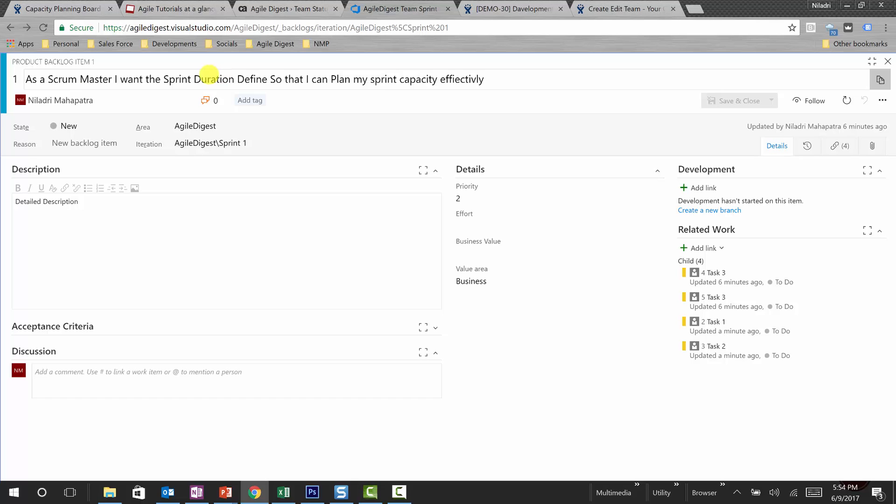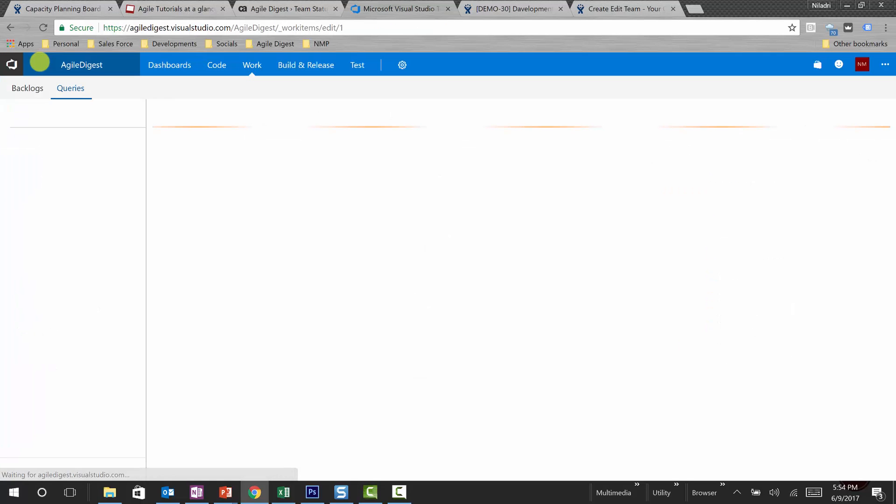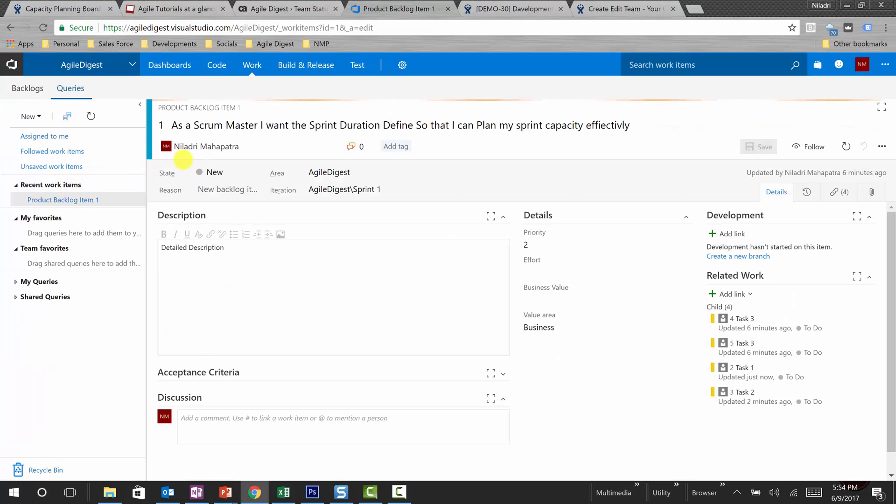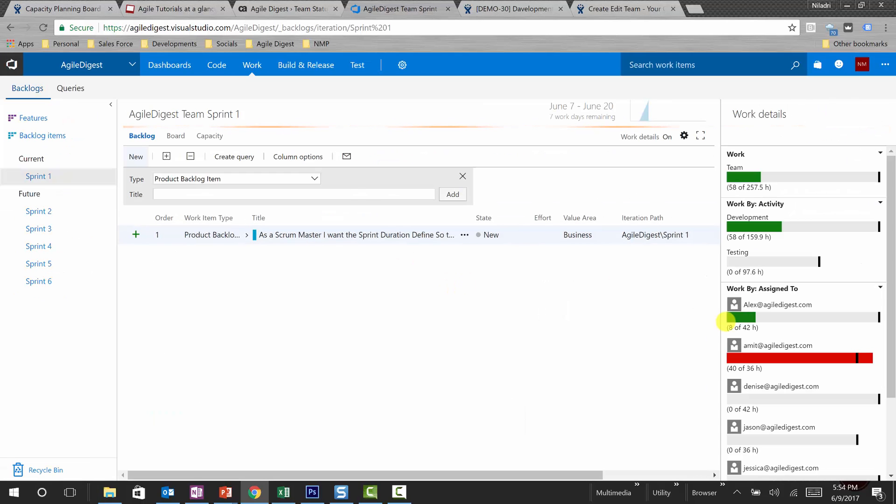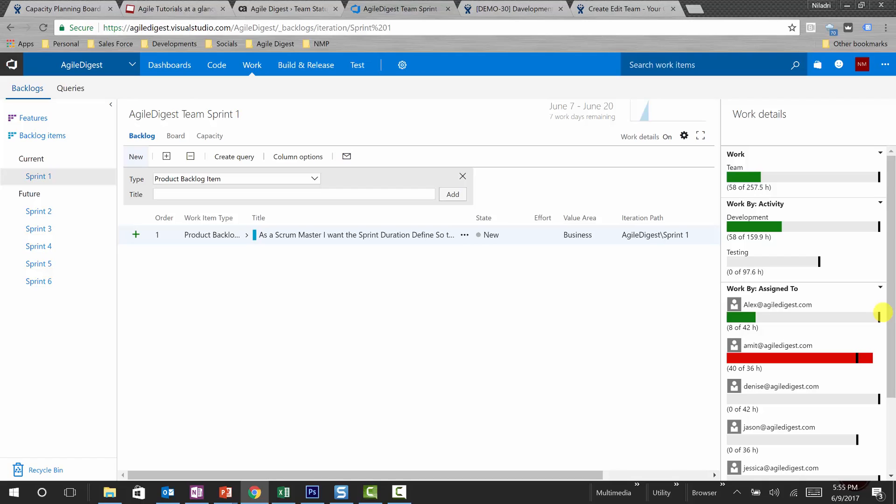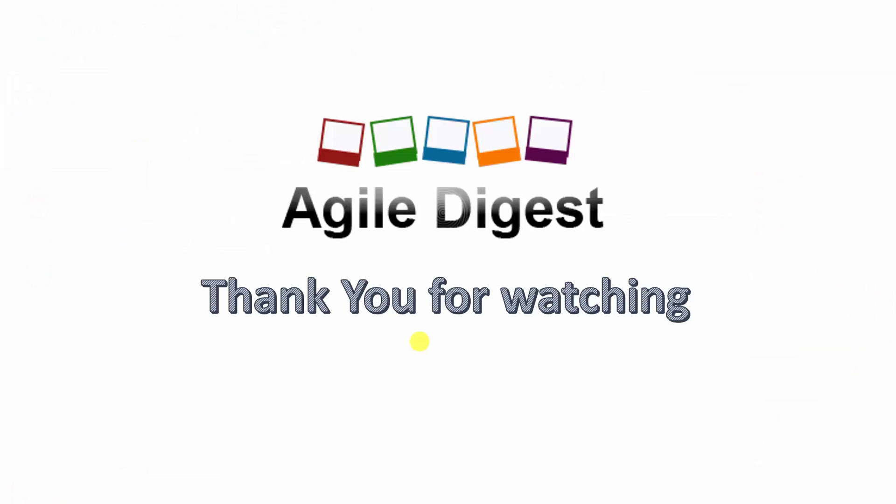This one was assigned to Amit. I will be changing the estimated effort to 40, and you will see that has now turned red. We'll go to backlog once again and see Amit's slide is turned red now because this was the capacity as of today, but total remaining work is this. So once we'll be doing sprint planning and covering that video, we'll be doing lots of this permutation combination to see how this is working.